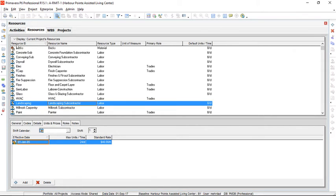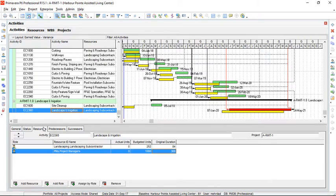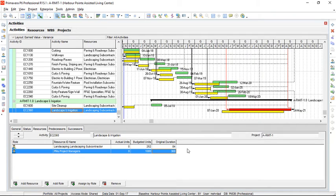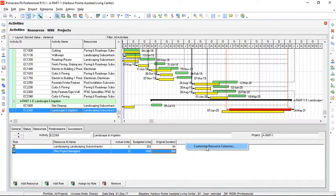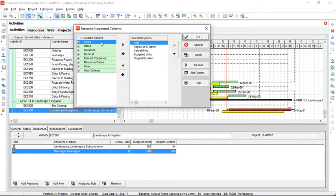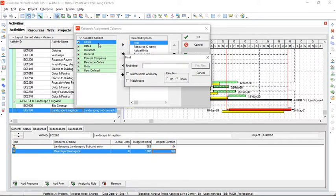Let's go back to activities. And in the resource tab, we can see another resource, project managers. So we can adopt a hybrid approach and add overtime to some resources and additional resources to others to fast track the project. At the moment, we need to add another column. So customize resource columns in here. And what we want to add is budgeted units per time.